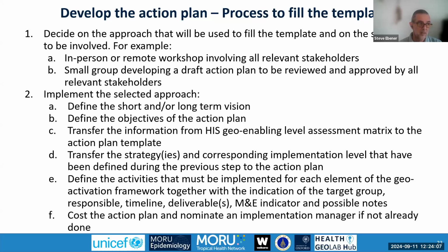Now, this being said, and this has been done also in other countries, you can very much also have a smaller group that is identified, with representatives from the different programs, as well as potentially external partners. This small group works on a draft action plan, which is then reviewed and approved by all the concerned stakeholders.